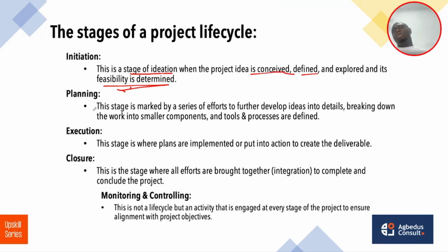Then we go into the planning stage. That is where we tell you, okay, for this project we need these chemicals from India and machinery from Germany. So we break it into various components and identify the tools and processes needed for the project to take place. It's very important for you to go into planning. You can't skip initiation and go straight into execution. Immediately you start, you find out there's something you could have identified during the planning stage which you didn't consider because you skipped that step.